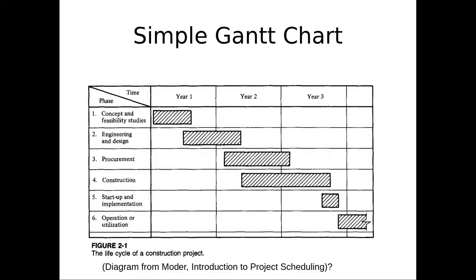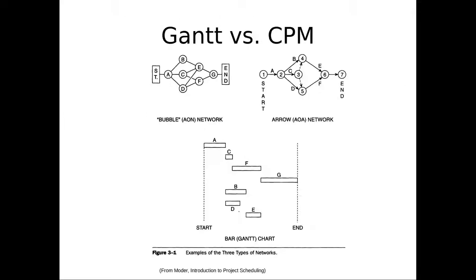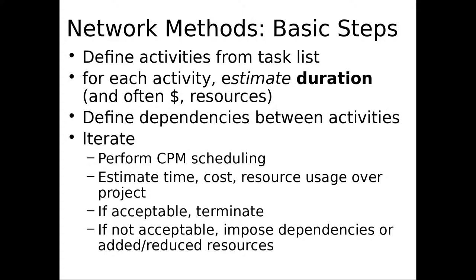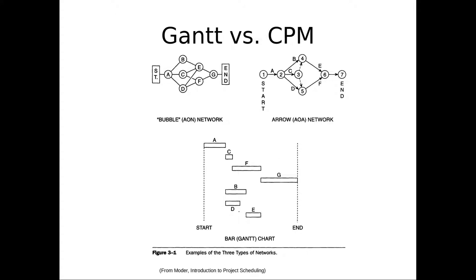Critical concepts there. You may find yourself listening to this lecture again in a few weeks' time. Okay, so the basic steps here: you can depict these in multiple ways. This is what's called activity on node, and we're going to be concentrating on that. Here, each node, each vertex, is an activity, and edges indicate dependencies. So this is saying B requires A to be done before it can begin, okay?